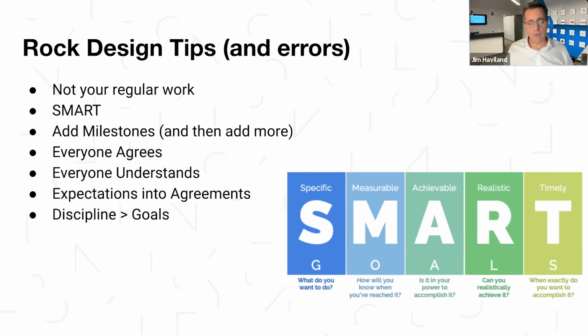And Christine, I know we've gotten really good at this at 90, looking at something and challenging one of our other team members and saying, hey, that sounds like a two-phase rock. What's the first phase of that? And there are two reasons for that. One, because I don't want to give you a rock that you're going to fail at. And two, because let's get to this place and determine whether it's still the most urgent, important thing. Right? Exactly.